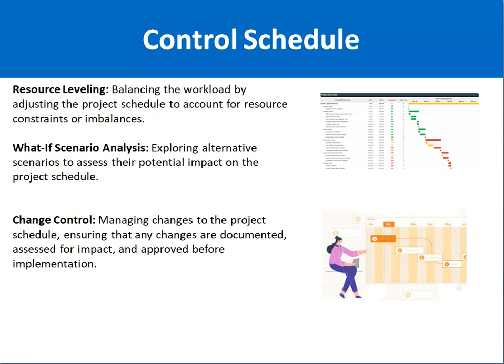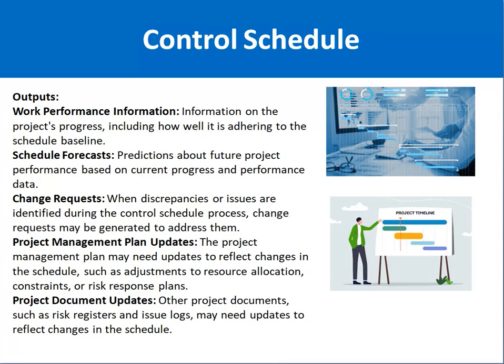Change control is another tool and technique. You must manage any changes coming into the project. For example, if initially five modules were to be developed and the customer requests one more module that was not in the scope or schedule, you must assess the impact of the change in terms of time and cost and get it approved from the relevant management.